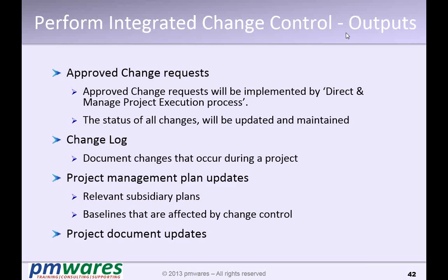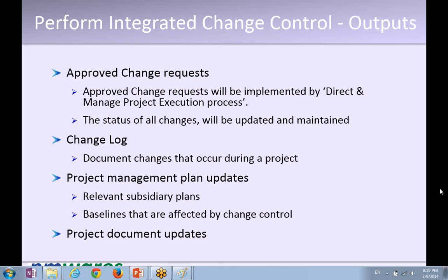Members of the change control board are not fixed, like, based on the situation, we can add in people and get approvals from them, right? Not fixed doesn't mean that you will not fix on the project. There is no clear definition on that. You can include anyone. But in a project, you need to decide who will be part of the change control board. And once decided, those people will remain in the change control board. So it will not be varied in a project. Once in the initial planning time you have decided that these are the people in the change control board, then it will remain for the project life cycle. So you will not change the change control board every time. On a different project, the constitution of the change control board could be different.